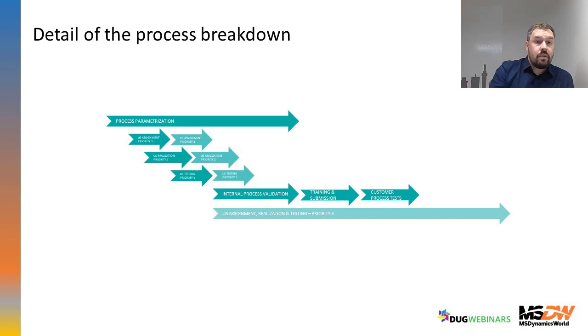And so just now everybody knows, for example, if you are using in DevOps agile planning, that tasks assigned to user stories priority one should be at the nearest first sprint and scheduled at the first time. Then you can plan another later. But you just now know what is the most important you should focus on.